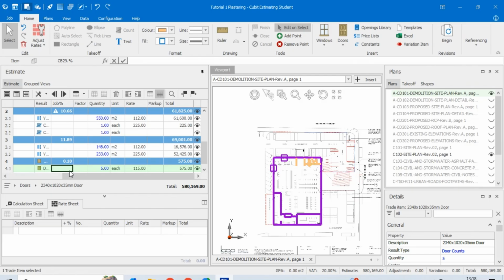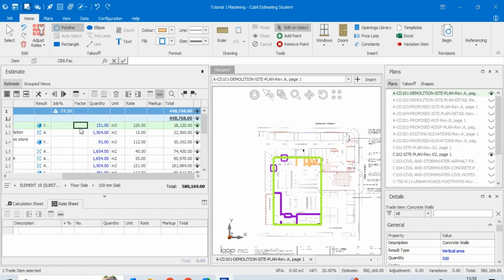So we can also use a factor according to your project, and also according to the rate, according to the country, according to the code. So this is just an example. This is why you give the factor. It can't be 0, because that is a factor that is multiplied by the totals to get the actual amount.